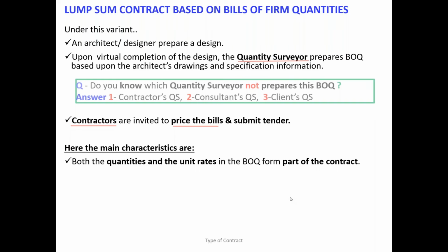We will see that in the later part. Somehow the rates are a kind of benchmark for you to agree the new varied item, but subject to challenge. It is not a remeasure contract. But anyhow, we have the rates and the quantity.